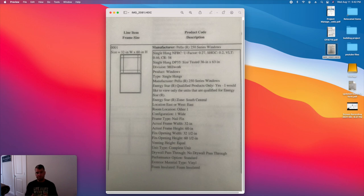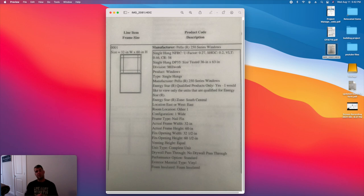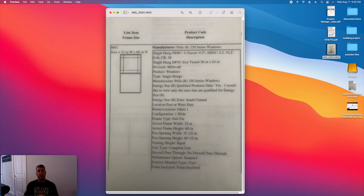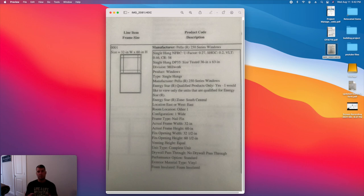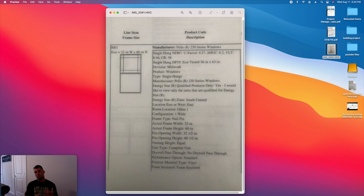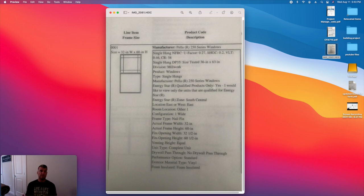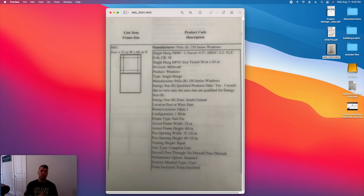So I just happened to get lucky. I didn't know that ahead of time, but I started to work on the HVAC planning. And one of the things that my building performance scientists needed to know was the performance numbers for my window, or for our windows. And so I started to do some research. I thought, hey, we need to start picking out our windows. And we started to notice these long lead times. So if you're going to do a build, it behooves you right now to start thinking about windows early on, like us. Because you don't want to get your framing and stuff up, and then have to wait two and a half months on windows. And the building just sits there unfinished. So we got lucky on this one, again. And our windows are on order.